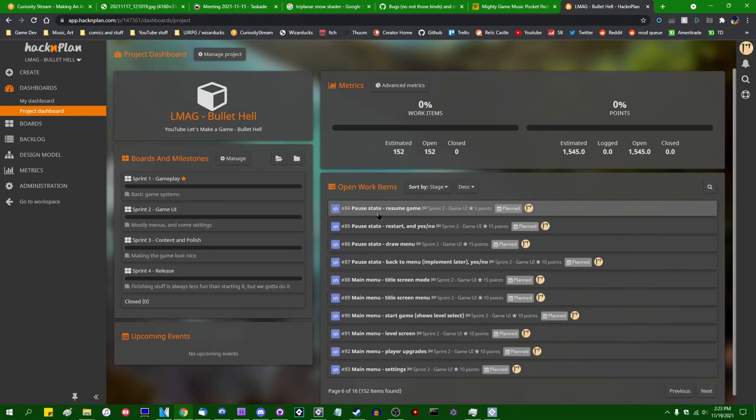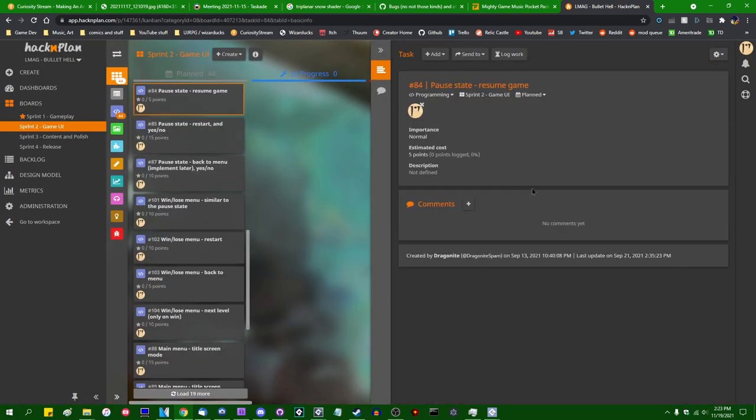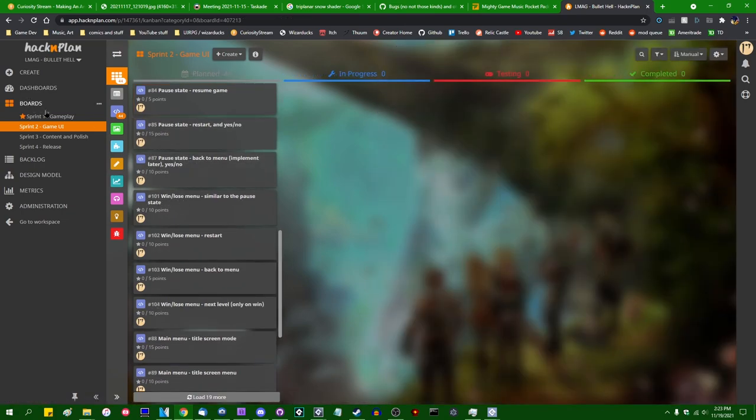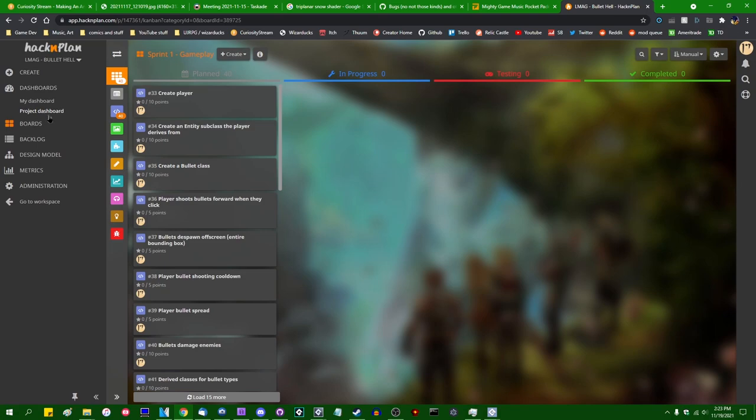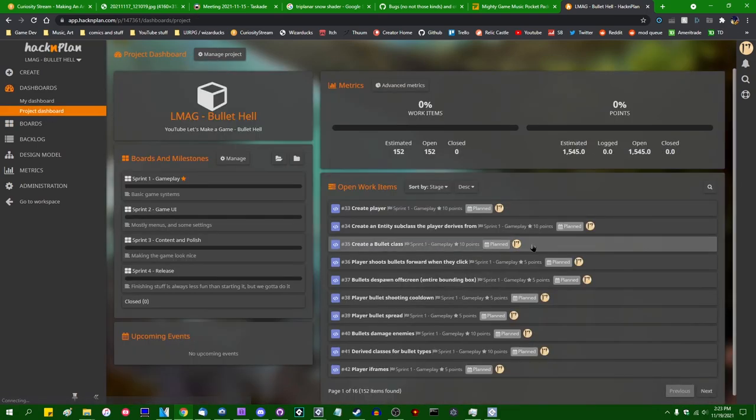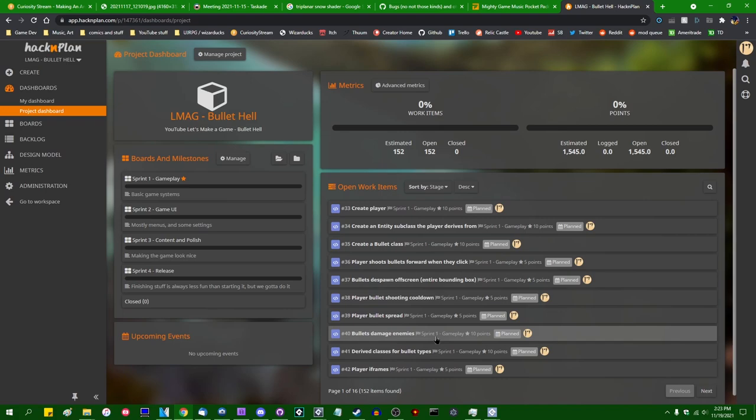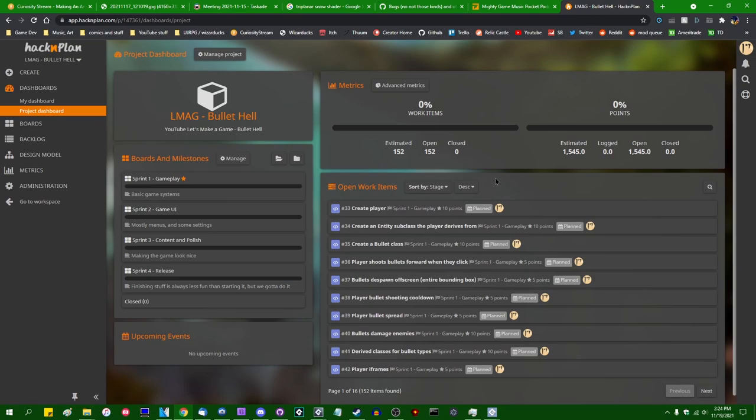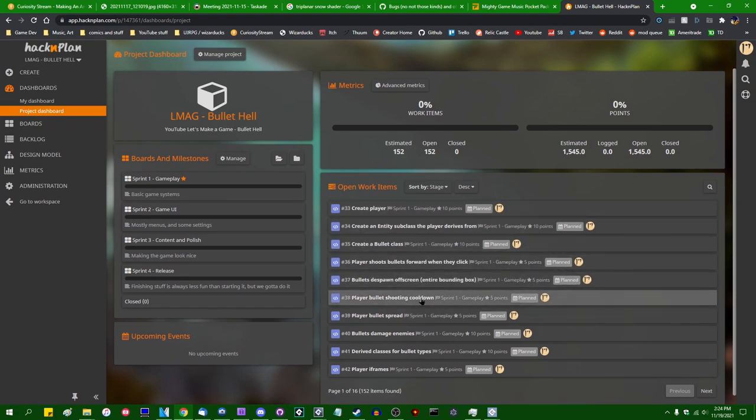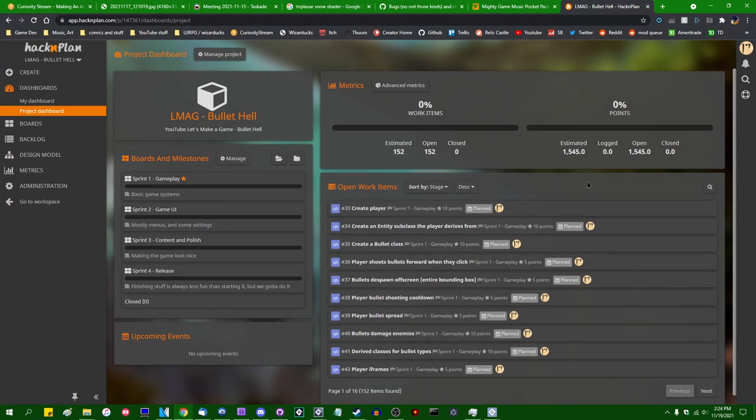So as you can probably see, each of these items on this project management list has an estimated cost of points. This is more or less arbitrary. This isn't based on the amount of minutes I think it'll take to complete a certain item or not. It's just my prediction based on how complex I expect the item to be. Hopefully, on average, I think I should be able to get through maybe 40, 50 points per video. And I'm sure there's going to be bug fixing episodes and that sort of thing further on down the line that slow the pace of the game down. Unless things go catastrophically off the rails, hopefully this series should be finished in about 30 videos. Especially at the beginning, where things are simple and when I'm just getting started, I should be able to burn out, honestly, a lot more items than that at the beginning.